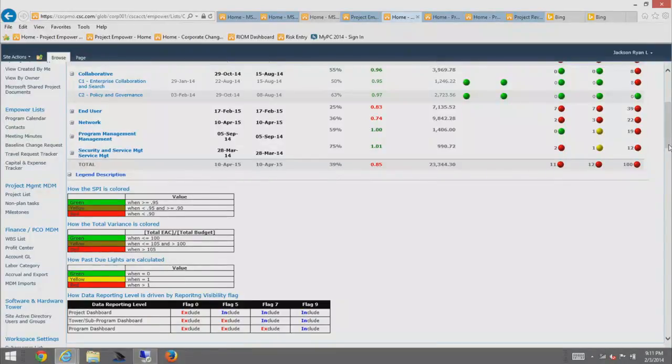recalculate. When you think about 100 plans in a master plan in the system with thousands of links between them, it could take us up to 30 minutes to open up a project plan, and that was not sufficient for us. So the Matan guys had a solution called Master Link that basically broke the links behind the scenes and relinked the information together, and they can tell you more about the product. But it sped up our ability to manage dependencies and interdependencies between our schedules.